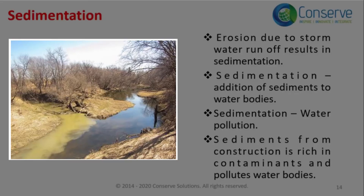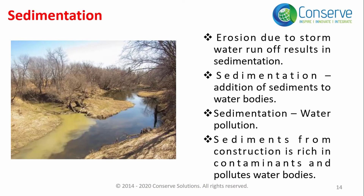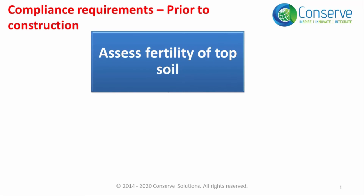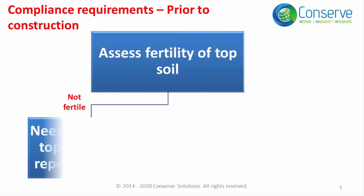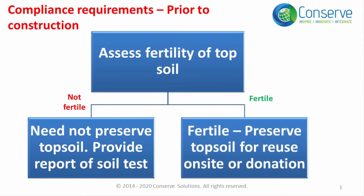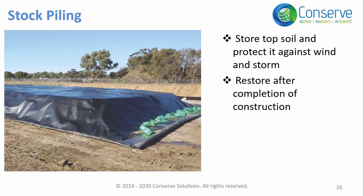The picture clearly shows how a water body is polluted with incoming stormwater runoff. Sediments from construction sites are rich in contaminants and create a larger extent of water pollution. The first step in compliance is to assess the fertility of the topsoil, which is the layer of soil within 10 to 20 cm from ground level. If the topsoil is not fertile, submit a report justifying that there is no need to preserve it. If it is fertile, preserve the topsoil to reuse on site or donate it. Topsoil is generally preserved by stockpiling — storing it in a location unaffected by construction and protecting it against wind and storm — after which it can be reused or donated.